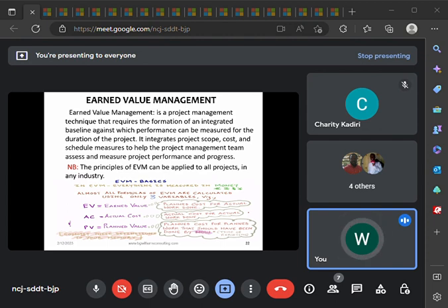While PV, which is the planned value, is the estimated value of the work planned to be done, which also means the planned cost. For instance, now we plan to spend 5,000 for 3 days. PV is 5,000 for 3 days. Day 1, we started work, and we now discover that by day 2, we spent 4,000. So the actual cost now is 4,000. The planned cost is 5,000.